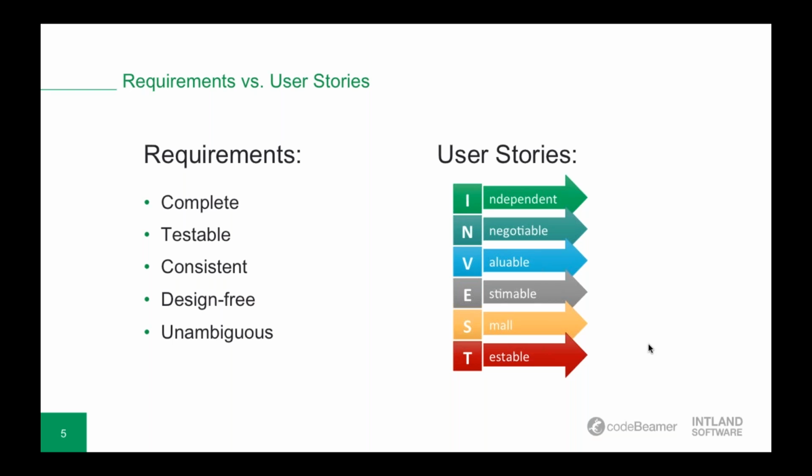So our user stories and change requests are then further decomposed into specific tasks, each with well-defined DODs, or definitions of done. So when is the task complete? And if you're going to apply both requirements and user stories in your development process, then the requirements would be on a higher level than user stories, between epics and user stories if you're managing epics as well.